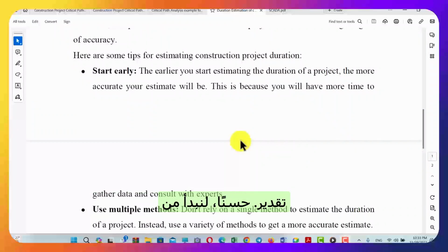Okay, so that we start from the work package level down in the bottom of the WBS, or the work breakdown structure, and go up, and then aggregate all of these estimates and then add the buffer generated from the process of risk analysis to reach a point of good estimation.